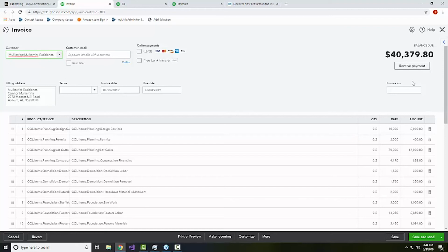On this job, for example, maybe we have an agreement or it's in the contract with the customer that we get 20% upfront and then 20% per milestone that we reach at certain points. If that's the case, again, for ease of use and Holly to follow your method there, I'm probably going to go ahead and set up all 5 of these invoices in the beginning. And maybe just date them when I think they should come through. But this would allow us to send them out as appropriate.